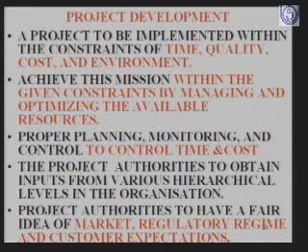But the next part is when I am implementing a project, what is important is time. Once I decide to go ahead with a project, I have to implement it in the least possible time. What happens if I delay a project? During the construction period, I have taken a loan from various agencies, and I am required to pay at least the interest part of it. That interest part has to be taken care of.